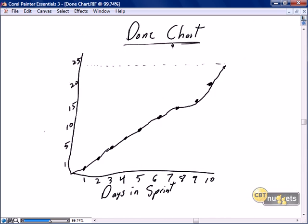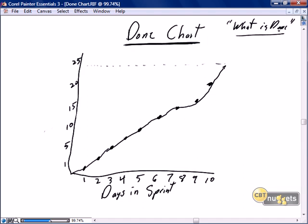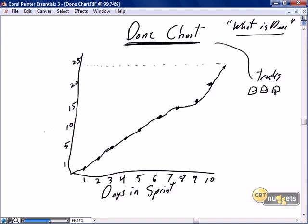Now I want to introduce one of the new progress tracking charts that I personally find very, very valuable in my work. I simply call it the done chart. This is based on what is done. You may choose to call it the 'what is done' chart, but I like to simply call it my done chart. What is a done chart? It tracks the tick boxes for each story when ticked.